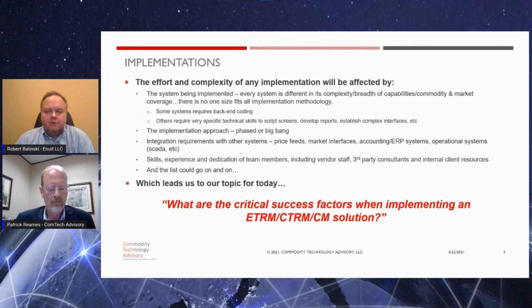Then as they go through the project and as we get ready to go live, a couple months before go-live, and have the full-blown training sessions, we almost like to run the training sessions in parallel, or in partnership with those subject matter experts, because they already, for the most part, know how to use the system. And we'd like to see them almost step up and get their teams in there and do a little bit of in-classroom, hands-on type of training.